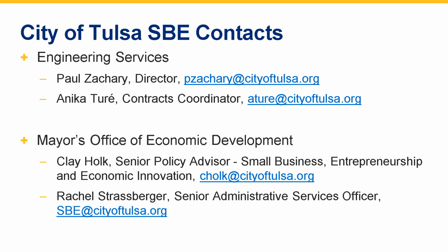There are situations where we cannot get to the 10%, and this is a long answer to the question, but basically we do one-on-one discussions with all our consultants. We go through this with every letter of interest and statement of qualifications that we send out. We talk about the SBE utilization and the instructions, if they fully understand it, and want to know their plan. And in the selection of the consultants, it's part of the criteria that we give points to: their understanding and their commitment to the SBE program.